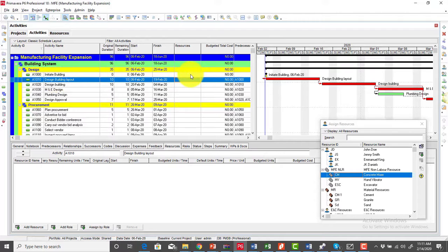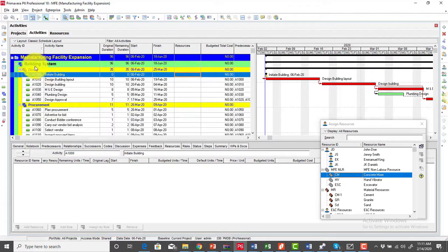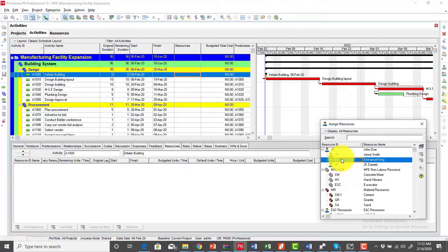If you notice, within the very first one, which is the milestone, I am not able to assign resources to the milestone task, simply because it's a milestone, and like I mentioned earlier on, milestones have 0 durations. They do not represent activities, they are basically major indicators.